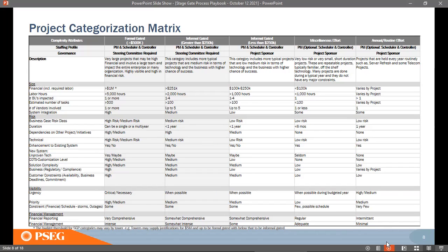So it is you who will be defining, and this is where the help of other teams comes in. You remember I said in the initial design phase, you are going to involve the security team and the architectural review team, so that you don't have to make the call if you are not sure. Those teams will help you decide what gated it should be, a formal gated or an informal gated project. One of the parameters is the budget of the project.